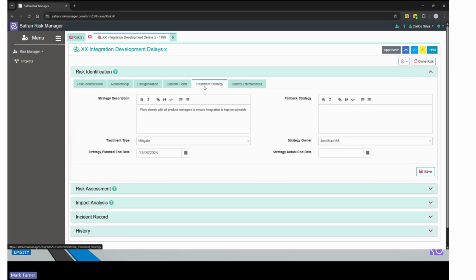We also want to say, what is our strategy for treating this risk, to either prevent its occurrence or to mitigate it should it occur. So we can have an overarching conversation about the strategy which we're going to take, but these aren't the same as the individual actions which will be allocated to the owners and the users once we understand the causes and impacts of the risk, which I'll talk about very shortly.